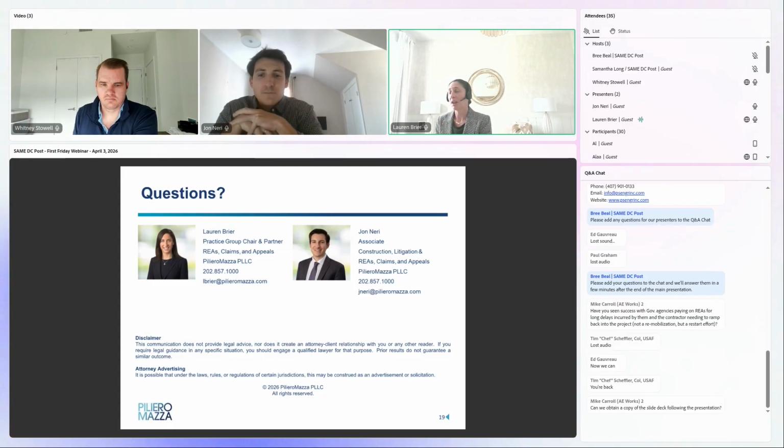Initial pleading, and you get right into discovery. That's discovery requests, that's depositions, that's production. So it is just like standard litigation. And we all know, or at least John and I know, that litigation can take quite some time. And then say you get to your hearing, right? Hearings can take 2-3 weeks to complete. And then even when you're done with the hearing, it can take over a year for a decision from the Court of Federal Claims or even from the Board of Contract Appeals.